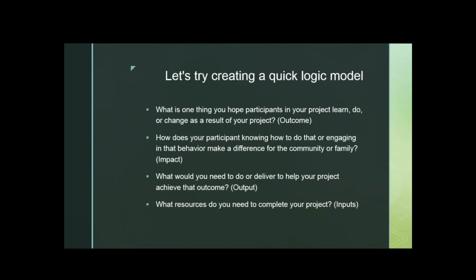We were discussing outputs, but what I was talking about was how your outputs lead to your outcomes. So for instance, if I know that my outcome is I want people to connect with each other, that's my outcome, because it's a change in user behavior. They're connecting with each other where they weren't. Yep, exactly. Then my outputs are going to try and create opportunities for them to connect with one another.